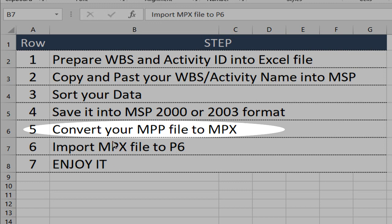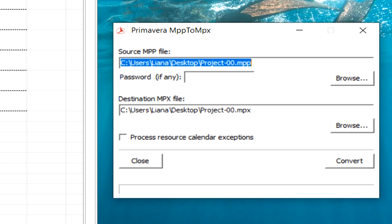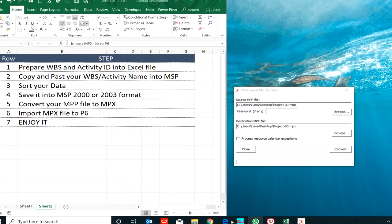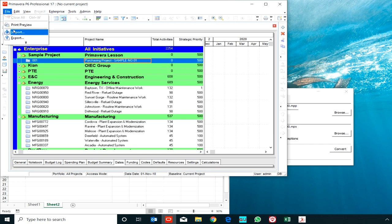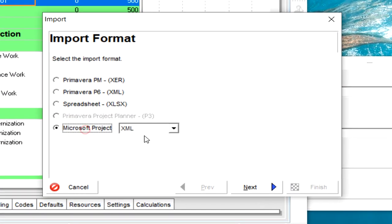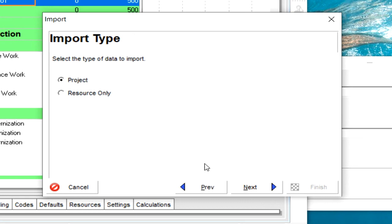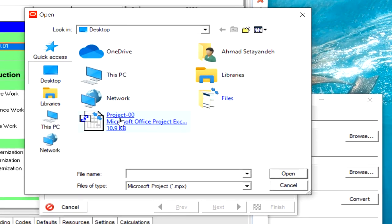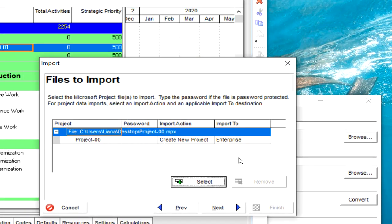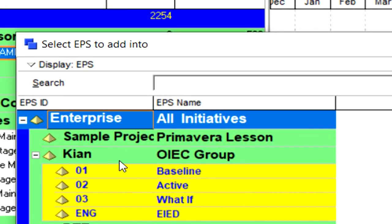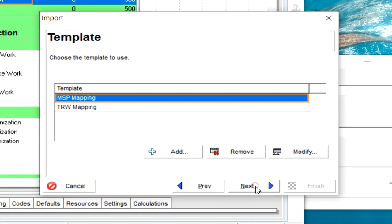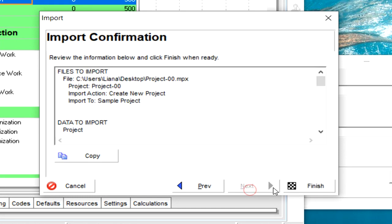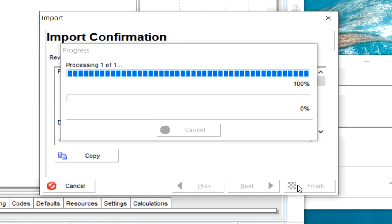We are on step five. Only one step remains. Okay, process completed. I open P6, use Import MPX Project, select the MPX file, import it to sample MSP, mapping is good, finish.